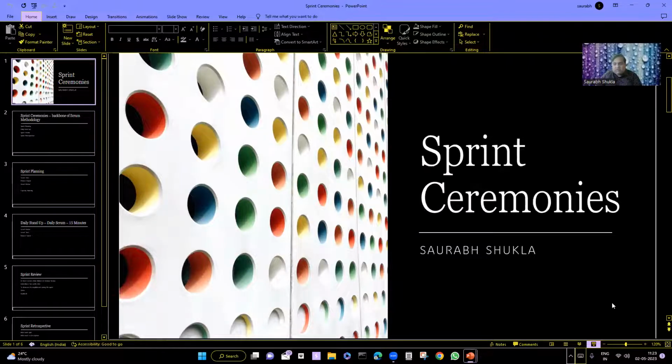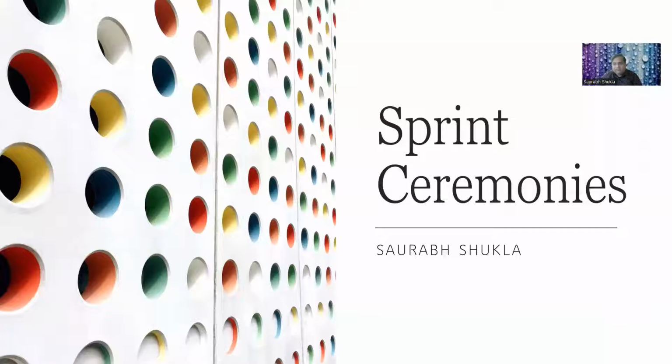Let me put it into full screen. So, what are the sprint ceremonies? As you know, we all are working in Agile environments, doing our work in sprints. A sprint is nothing but a 2 weeks period of time, a smaller portion of the initiative. So initiative, then epic, then feature, and in the end it's PBIs, that is product backlog items. In the ADO board you will see that, and how many items you are going to pick in a particular sprint, which you can cover.